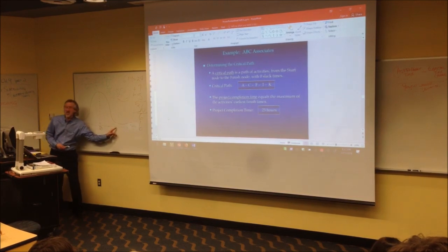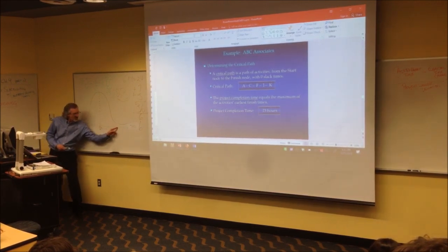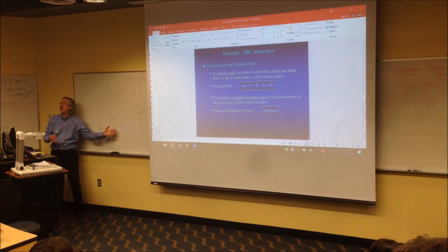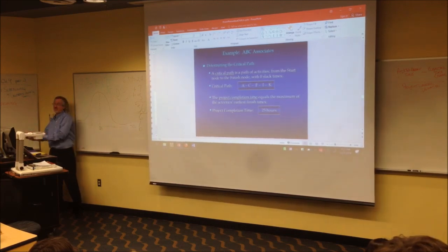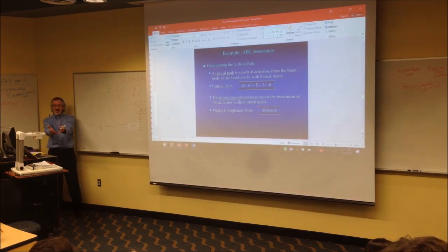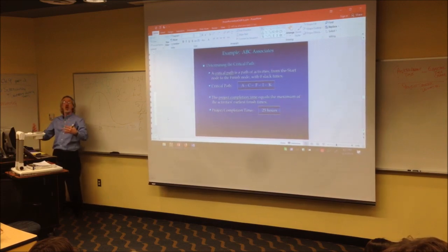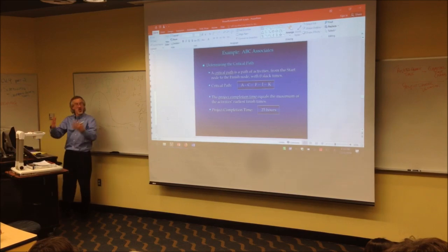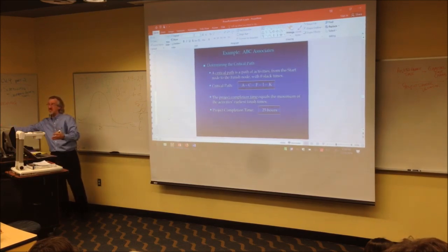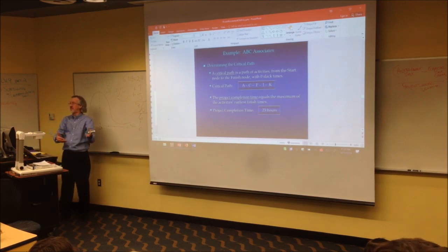So we need to know what this is out here. If this is a number line, what number would be out here giving us an 80 or 90 or even a 95% chance it's going to be finished? And the bank says, let's plan that schedule. Because with a 95% or 90% chance it's going to be done, we can all sleep well knowing that you're not going to have to start making payments out of your reserve cash instead of the revenue, because it didn't get finished in time.